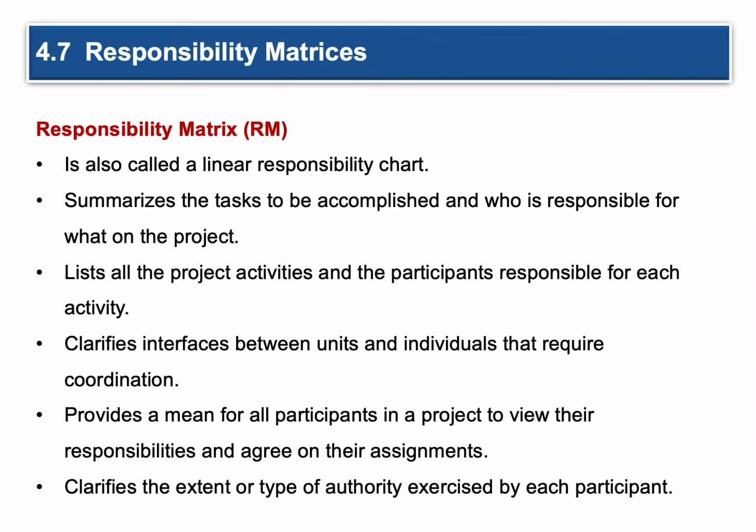It lists all the project activities and participants responsible for each activity and clarifies the interfaces between units and individuals that require coordination. It provides a means for all participants in the project to view their responsibilities and agree upon their assignments. Those things should be pretty balanced. If you have somebody doing all the work, they're going to slay you on the peer review, and that's going to hurt your overall grade.